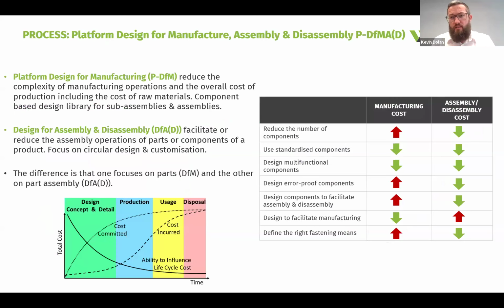So some of the acronyms, and our industry is great for creating acronyms that don't necessarily explain themselves. Just one thing on DFMA, design for manufacture and assembly: designing a product, and the building being the product, so you know that it can be manufactured, assembled, and then the extra D for disassembly. And you could put an R at the end for reuse possibly. The earlier you can action a change in that design, the less cost is incurred, the less abortive work is incurred. So the little graph on the left explains how we have the same amount of information to get through in our projects.